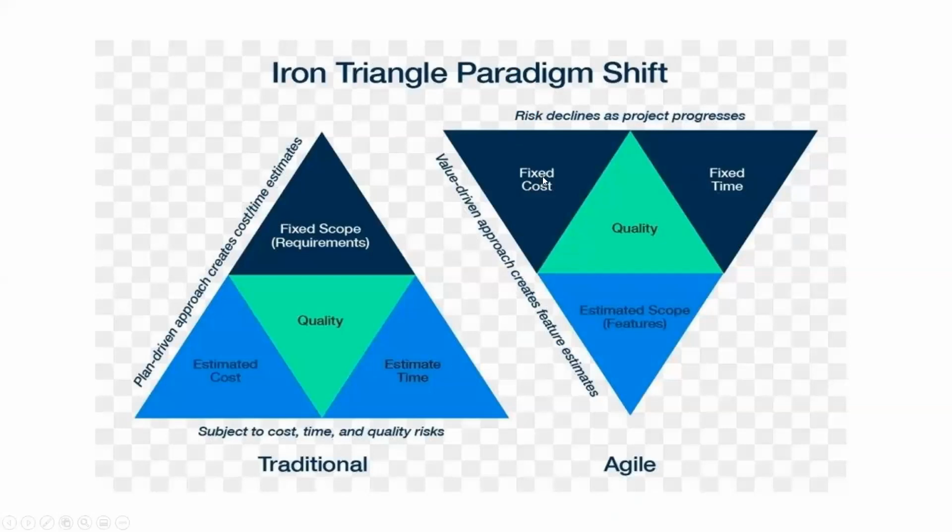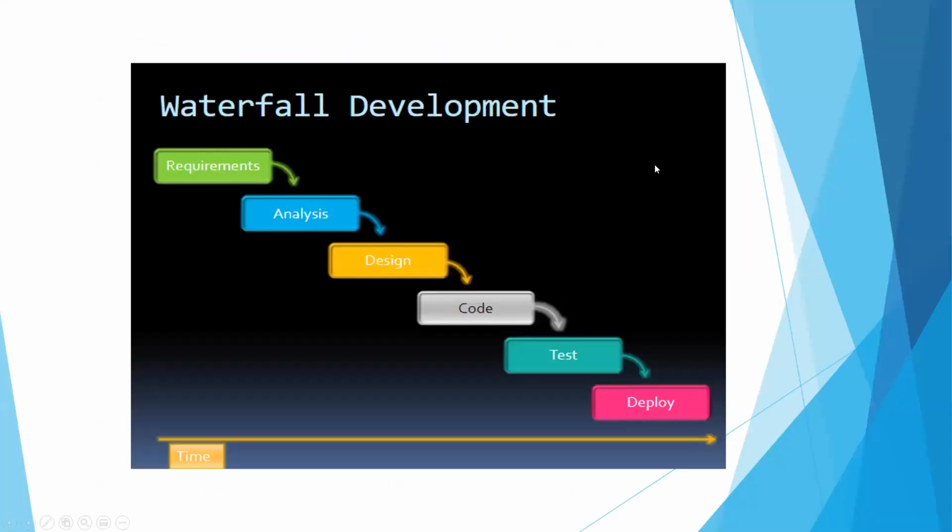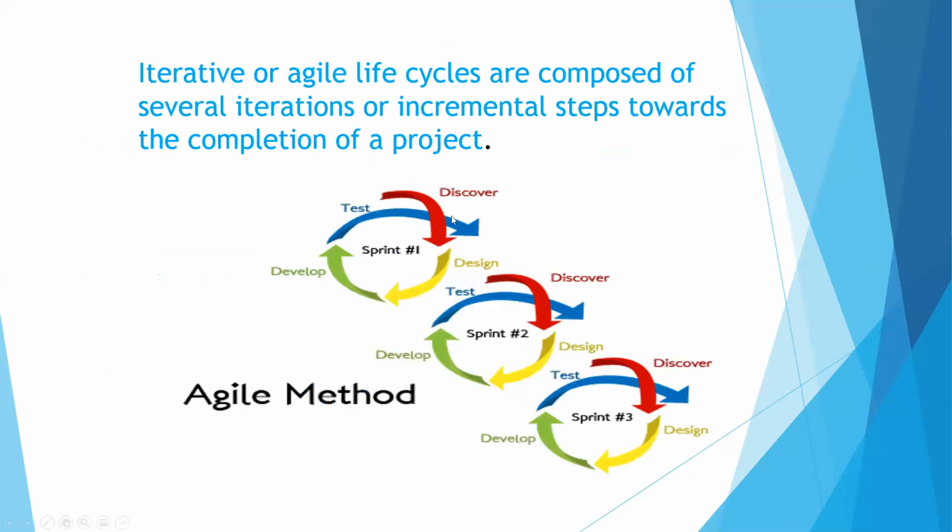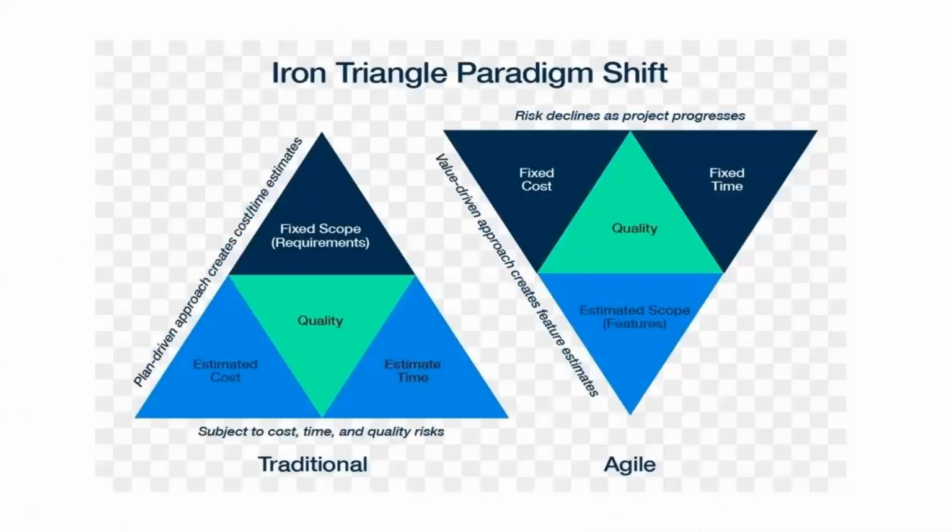It's the cost that is fixed and the time that is fixed. Part of the time being fixed is what I said before about the sprint. Our sprint can be 2 weeks, 4 weeks, or 1 week. So time is fixed here, and cost is fixed, because by the time you get to sprint 2 or 3, you know your deliverables.